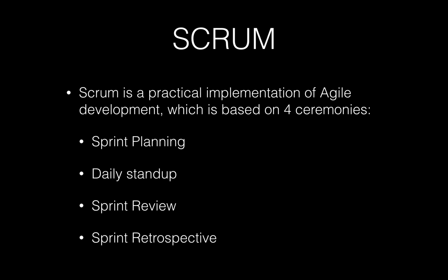A sprint is generally a small time period, and I'll explain that later. Sprint is like 1 week. So you're only planning for 1 week. What are you going to do? And you try to understand those tasks properly. That's all it is. The next form of collaboration is daily stand-up.